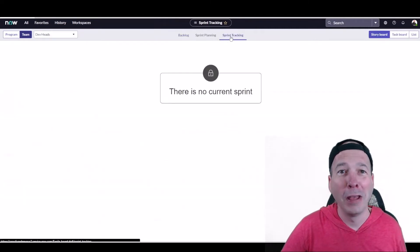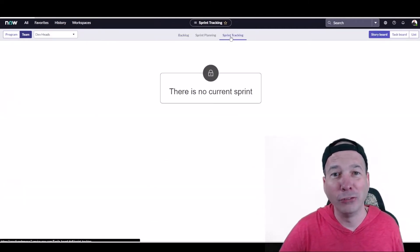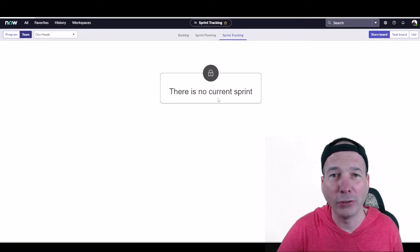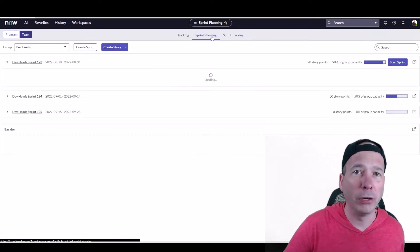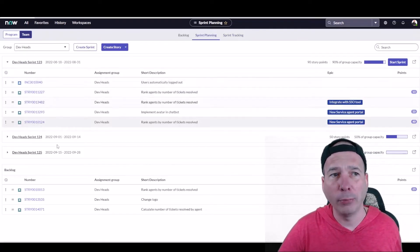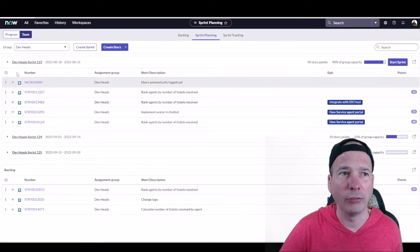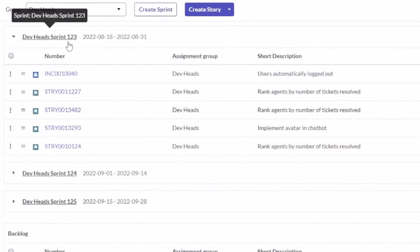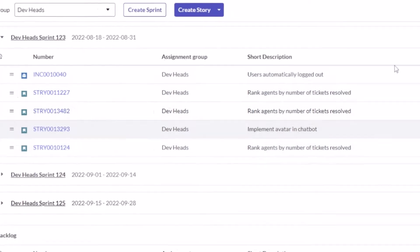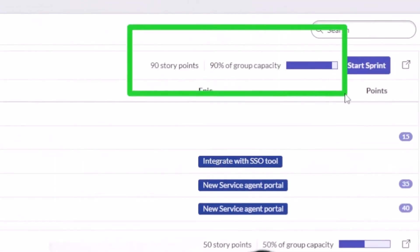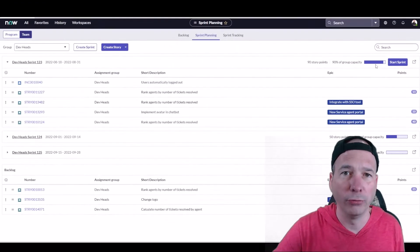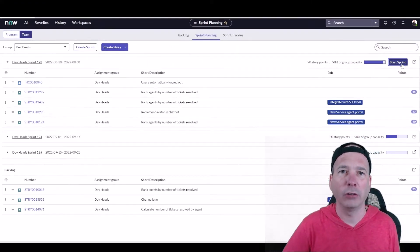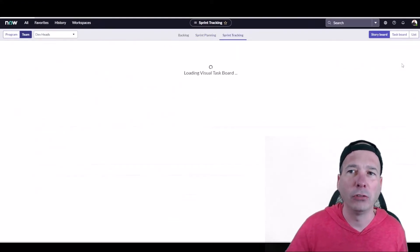I felt the need to come in here and finish up the last part of the agile board, which is sprint tracking. Now I don't have any current sprints at the moment, but in the previous video you saw I set up a sprint for the dev heads team. I've got dev head sprint one two three showing here. I've got an incident and some stories in my sprint. This sprint has a 90 story points capacity and I've filled it up 90% with stories. We just need to get started because we're developers and we like developing. So I'm going to hit start sprint.